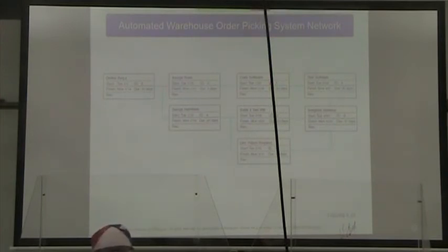So you'll notice here on our defined requirements, the duration is 10 days, but it starts on January the 1st and ends on January the 14th. Okay, and that's because we've got to take into account weekends.